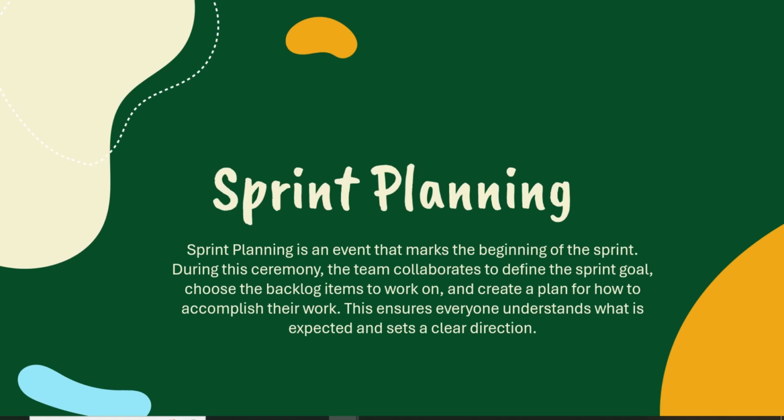The sprint planning is a structured meeting that takes place at the beginning of every sprint. Its purpose is to determine what can be delivered in the upcoming sprint and how the work will be completed. This event sets the tone for the sprint by aligning the team on a clear goal and actionable plan. It transforms high level priorities into a focused list of tasks. The key activities during the sprint planning include